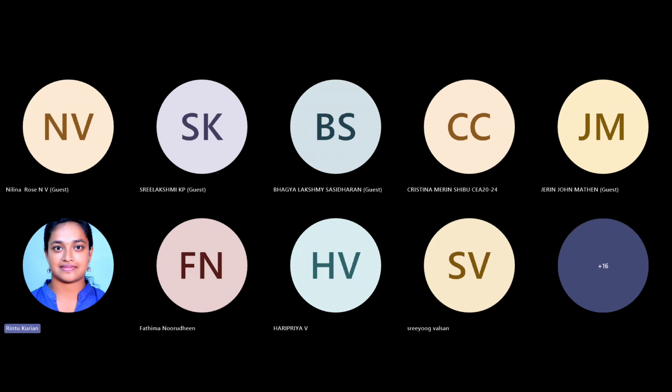Okay, so looking into this, wastage of material: wasting one bag of cement will cost you 420 rupees, but wasting steel will cost around 80 rupees per kg. That is excluding the rebar work cost. Steel itself is 80 rupees per kg, and when we compare to concrete, 1 m cube of concrete requires nearly 8 bags of cement, sorry, 8 bags of cement is the approximate quantity used for 1 m cube of concrete.